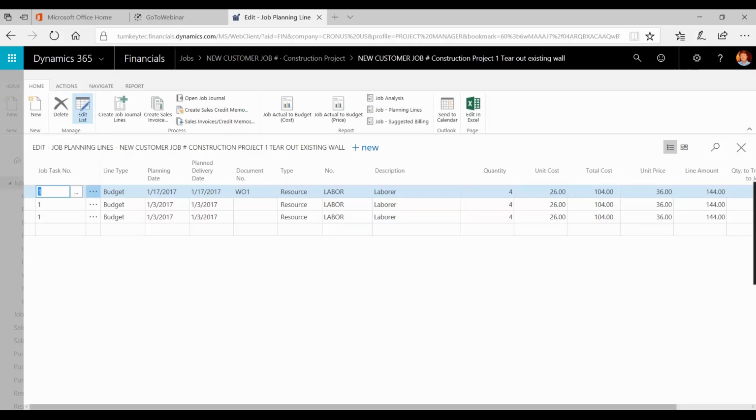Or I can do individual and say that's Bill Droege that's doing that job uniquely, and then have a cost structure that's unique to an individual, or again, to a resource level, and apply that. So you've got your cost, you've got your sell on the job, and you've got your budget comparison, and you'll measure across those three.